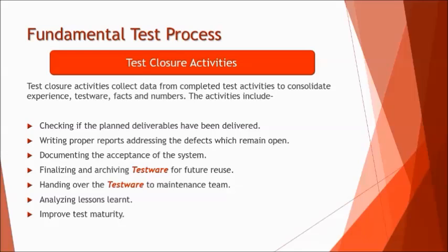Beyond that, obviously the entire details of what you have used, including the resources, the test cases, the tools, and everything put together is called testware, and we finalize and archive that, where finalizing means what all things you will need and have been using for the entire testing, and archiving is basically for future reuse. Because when you talk about a particular application's release, the very next version, definitely you will be working on that again. So we secure it, we store it and archive it for future reuse.